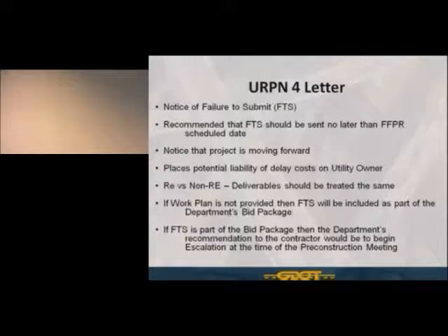Now, what happens if we don't have everything in place for utility certification? Hopefully, you all are aware of the URPN letters, Utility Relocation Procedure Notice. The URPN 4 letter, or better known as the Failure to Submit, or FTS, is a letter that will be sent out to you by the district utility office if there's a deliverable that you have failed to provide to the department, whatever that deliverable may be, whether it is relocation plans, permit, or the utility adjustment schedule.